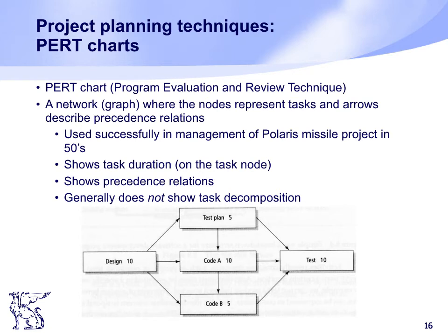Then it adds these to a Gantt chart. We have also discussed Gantt chart. Okay, so after using WBS, it then adds these to a Gantt chart to identify those activities that are interdependent. We already know that from a Gantt chart you can easily see the links between different tasks. So at first they break down their work, and then they use a Gantt chart to see the interdependence between the activities. So they identify those activities that are interdependent. So in PERT you use both of them, WBS and Gantt chart.